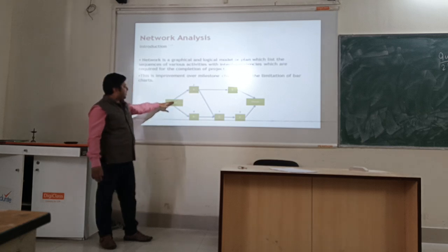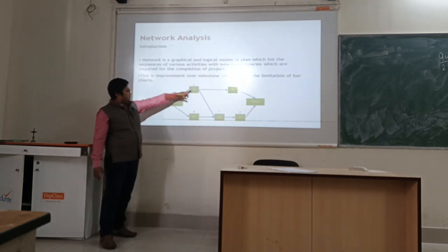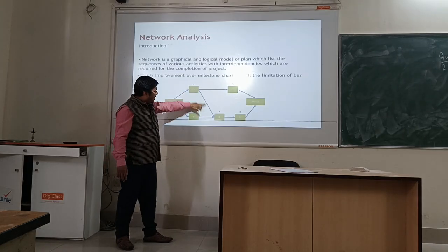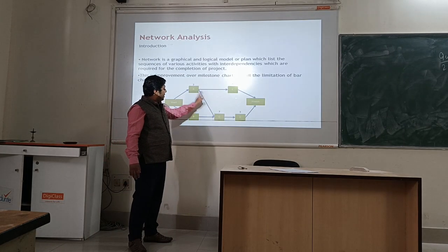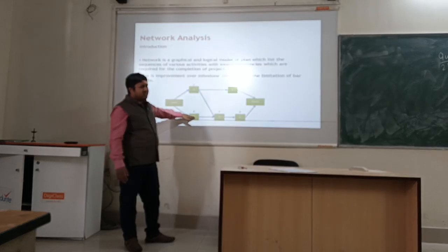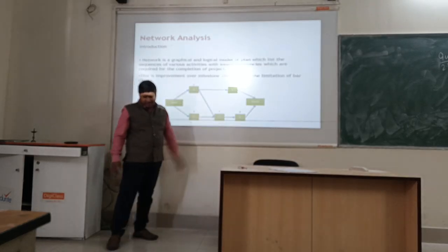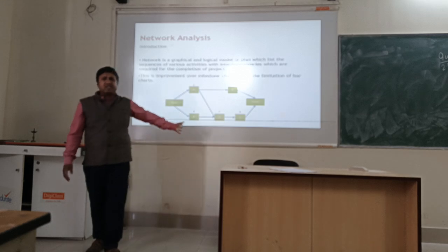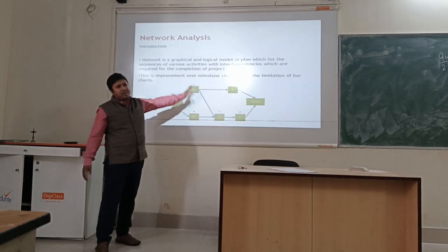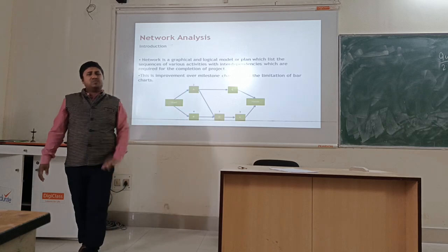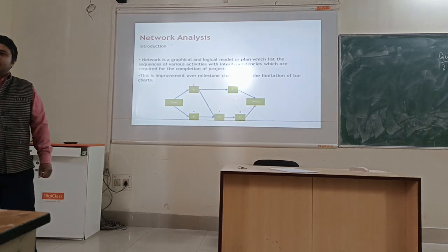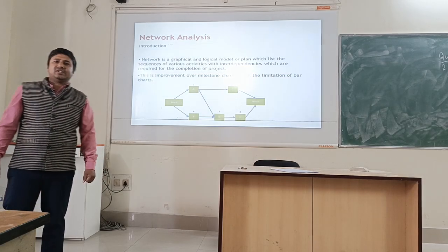You can see if we start, we have to perform activity A, and once activity A is finished, then we can perform activity B and activity C. Once activity B is completed, then only can we go for activity D. So the interdependency of the activities can be seen. Also, the time schedule required can be seen. In this way, it is more advantageous than the Gantt chart and milestone chart. Understood everybody? Any question?